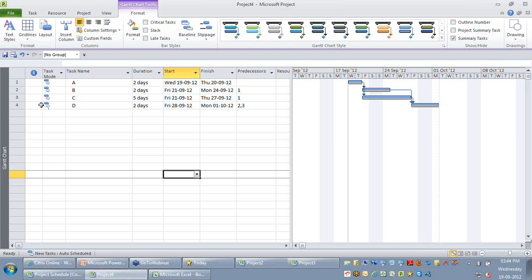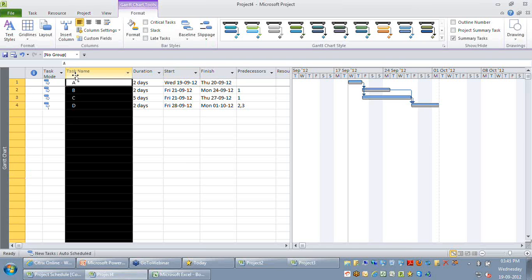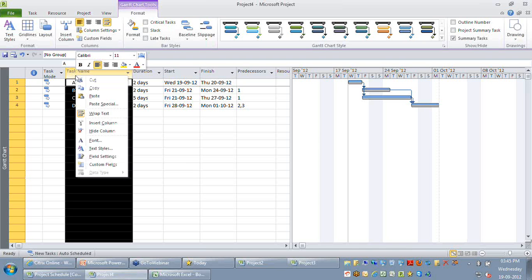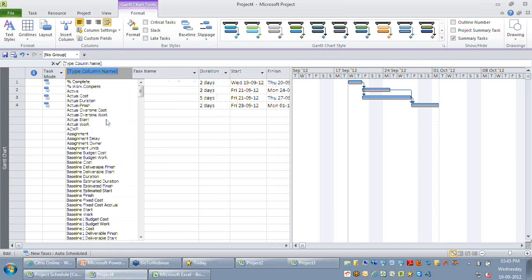So the first step is you go ahead and add that activity to your project plan. For example, I might want to insert a new task here. Let's say a flag or something else. Let me say flag 1. The flag is just an indicator. There is no significance on baseline. So we might try to use this particular column to flag which of the activities got impacted because of this new change.